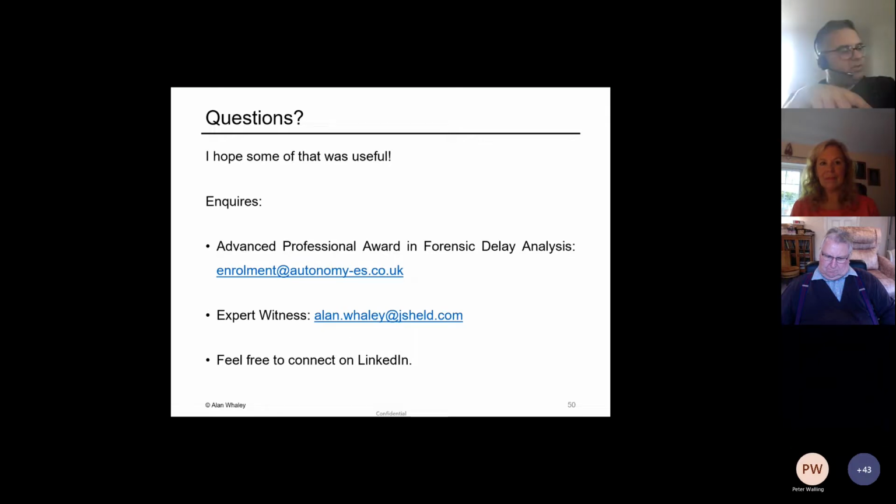So for that reason, because NEC basically requires the project manager to be assertive and proactive, it is necessary and it is correct to do a prospective delay analysis, because if that's not done, then of course we end up in a typical JCT scenario where we're having to look at things retrospectively at the end of the project. So if you want to think about what the best methodology for an NEC is, then probably time impact analysis is the best approach on a project.